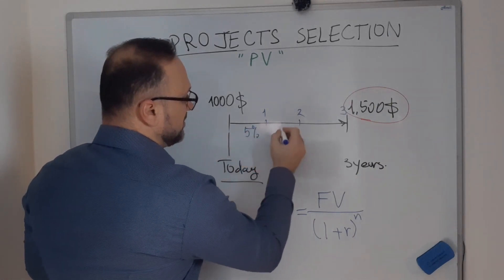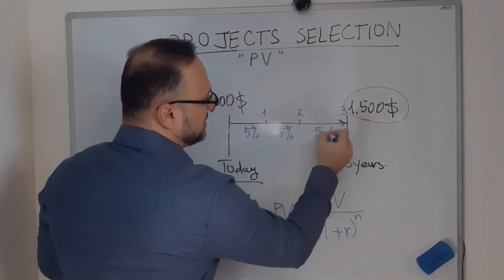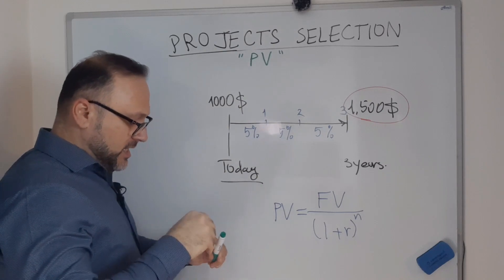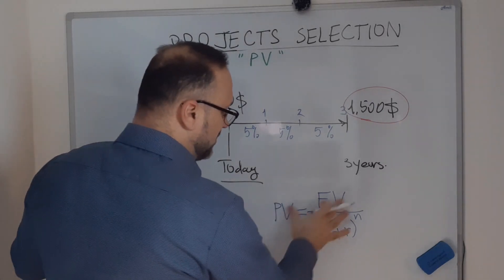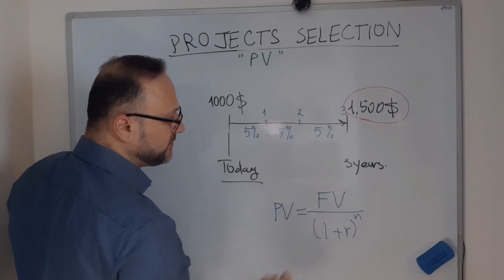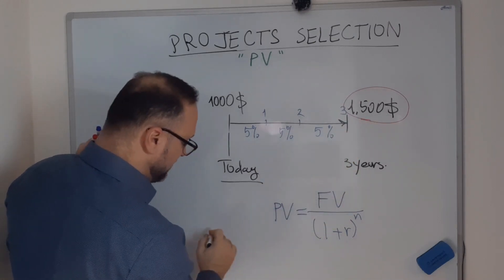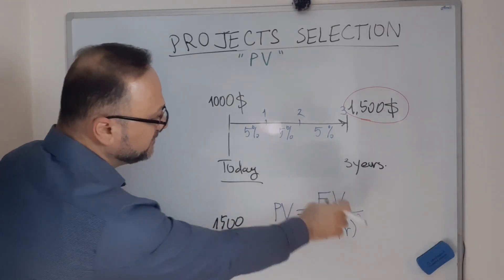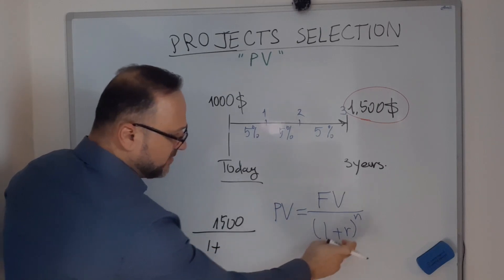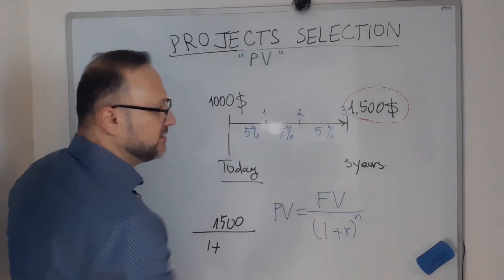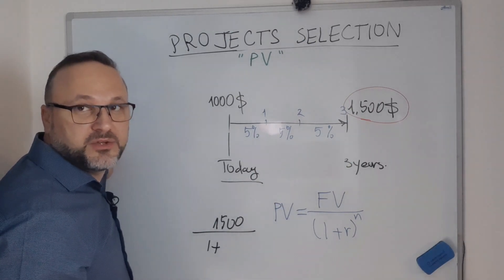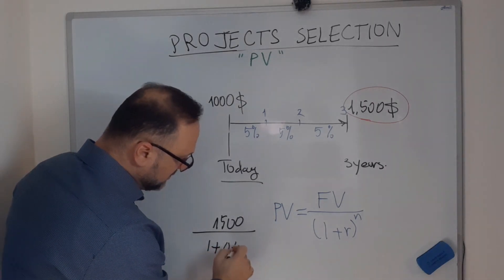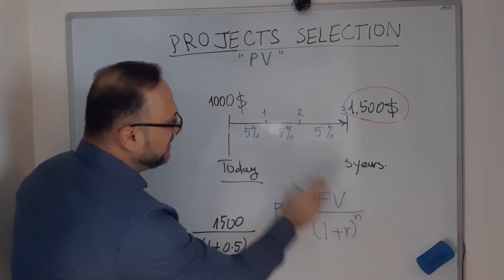5% per year, the ratio will be decreased. So with a simple math, if I will consider that my future value is $1,500, 1 plus r - the ratio is 5%, which means 0.05.